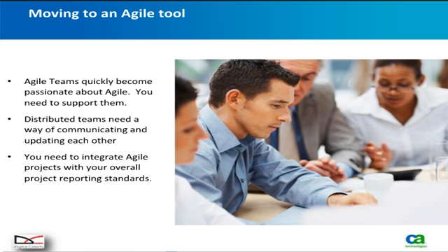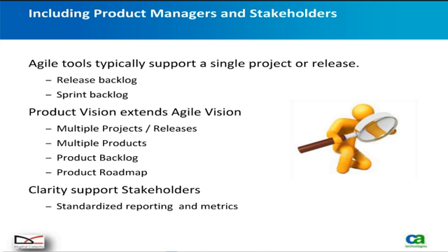The other real reason is if you have distributed teams. As I mentioned, you want to co-locate people as much as possible in an Agile development environment, and mostly we did that, but almost always you have one or two people who may not be in that same area. They have to be somewhere else, and so you do have distributed teams. To support distributed teams, you can't be just in one single conference room writing on a whiteboard or putting Post-its on a whiteboard, which is part of an Agile process. You need to support that in a software tool that can be shared with a common database and common collaboration means, and so that's a very important reason to have the tool.